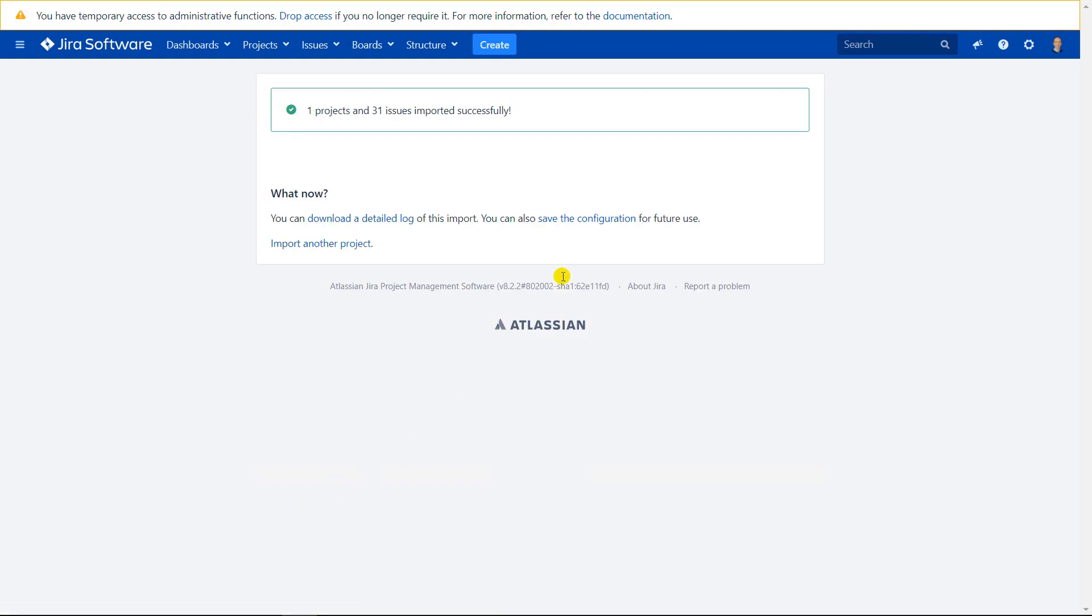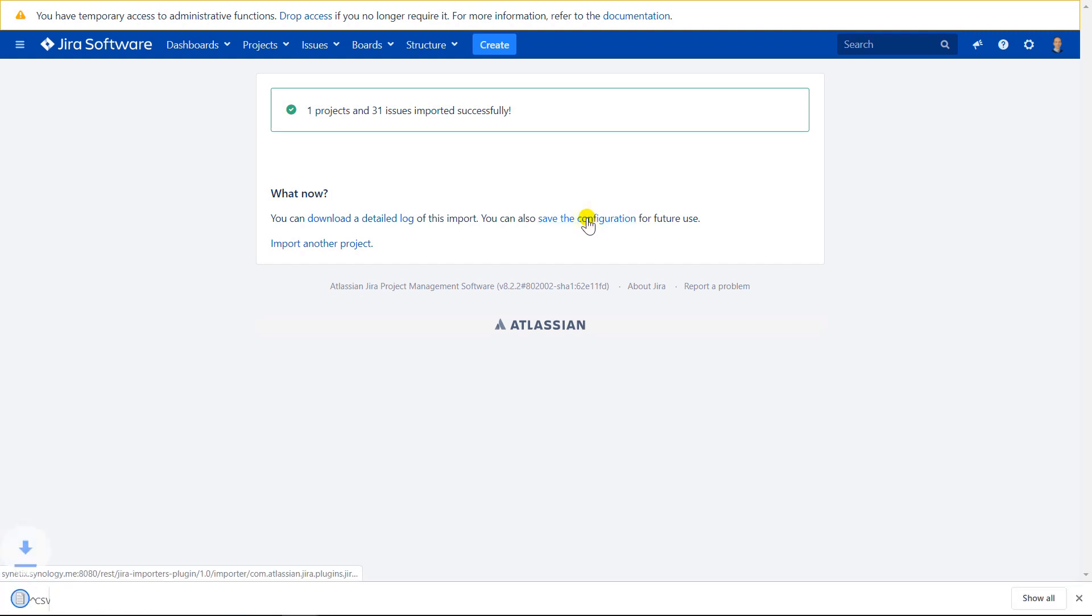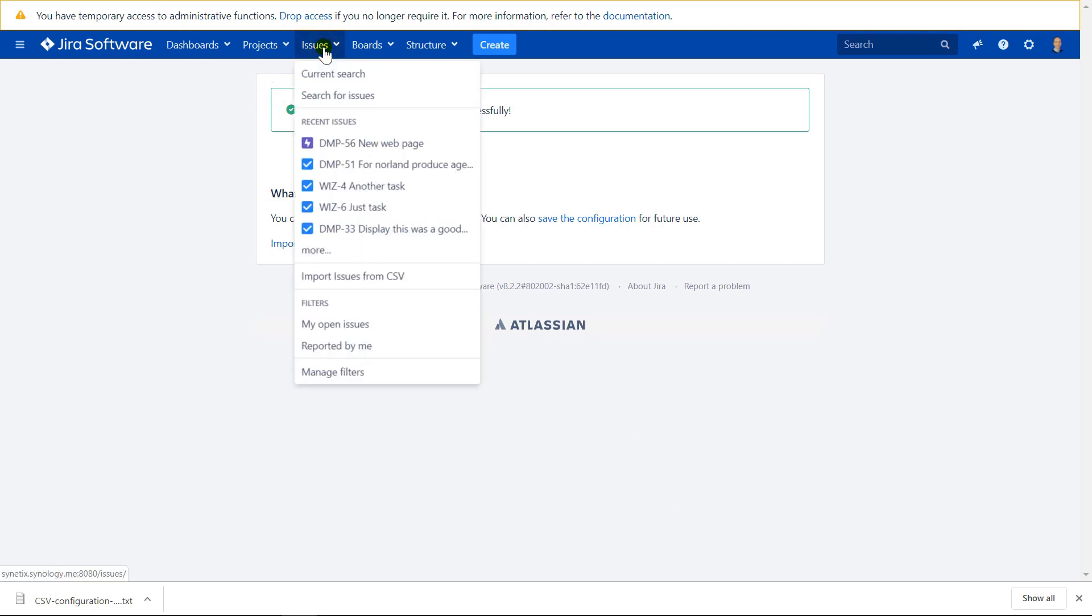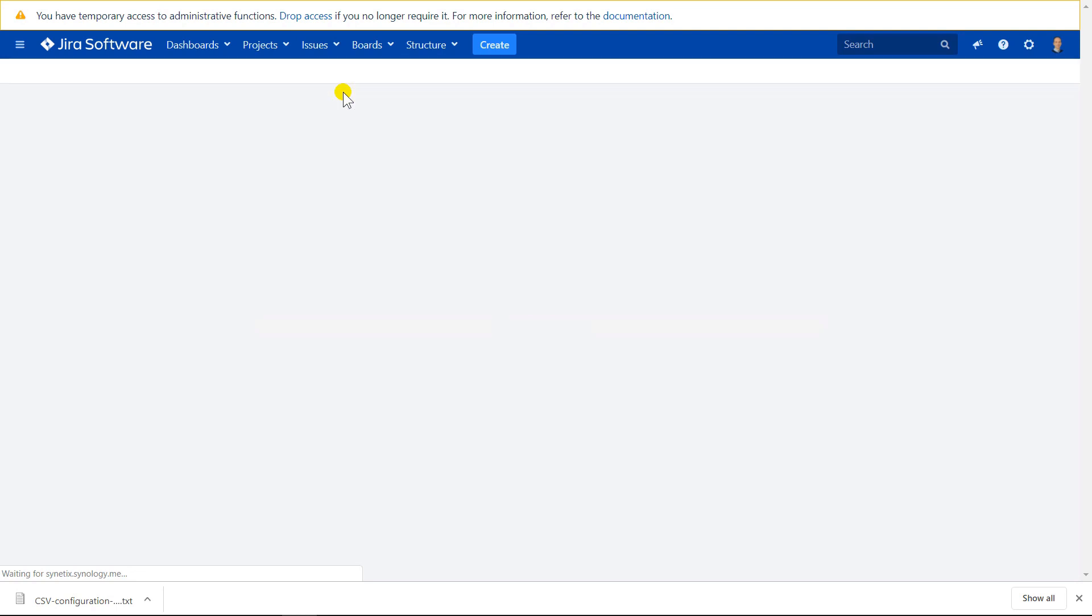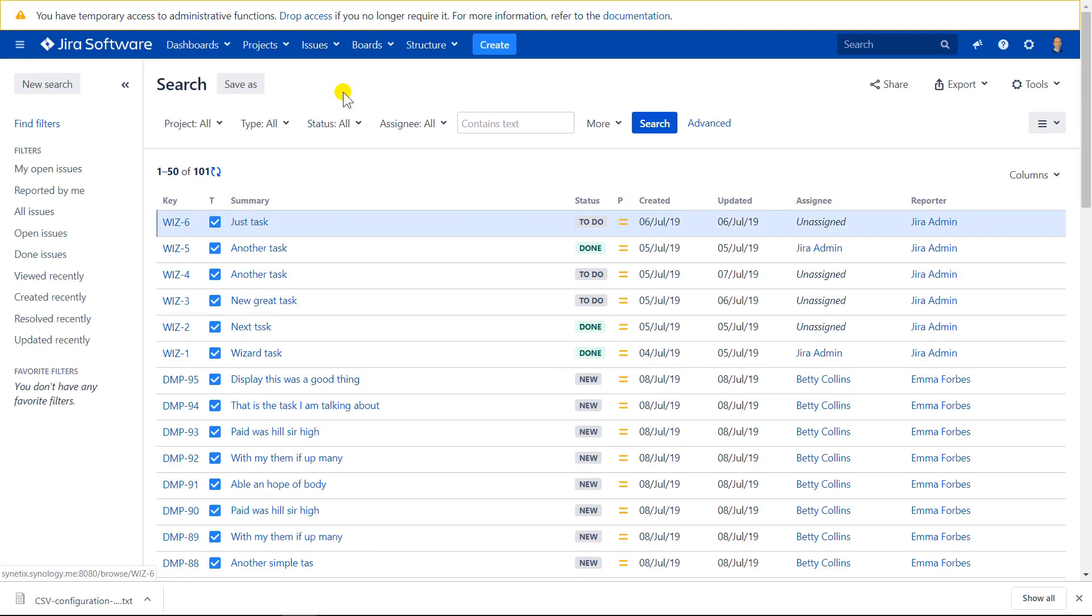So if you plan on importing more data like this, you can save the configuration file. And this file can be used to skip the field mapping step next time you import the same type of data into the same project. So if you want to see the results of your work, it is best to go to issue search functionality and review the newly created issues.